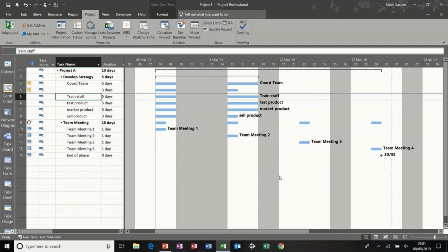So if you've got set tasks, for example, you do a concrete foundation, and it takes 5 days for that concrete to dry before you can do anything else on that task, that would be a 5-day critical task. You can't make it any shorter than that, no matter what you do. Other tasks can go on around those 5 days, but that 5-day period would be the critical task.